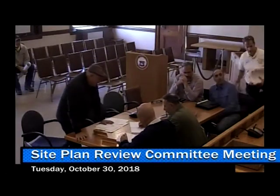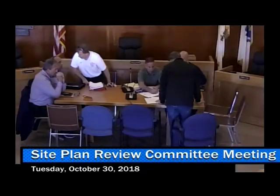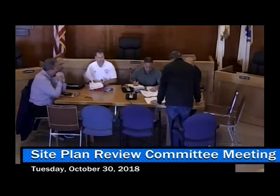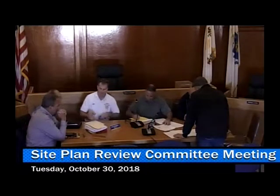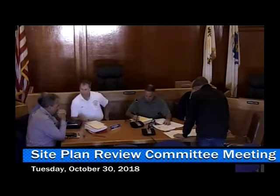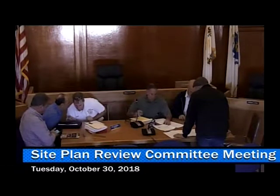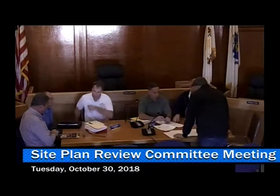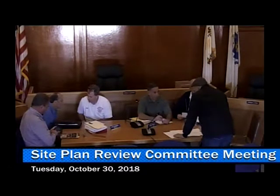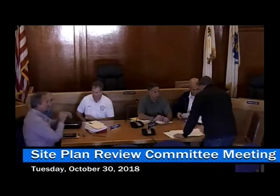Okay, so you're fine in the side setback, however, you need 20 feet in the rear, so we'll have to issue a denial letter. Rear yard denial. If you uploaded this to e-permitting, you will get a denial letter. You take that to the city clerk, and she'll give you an application if you want to file for a variance, okay? No problem.